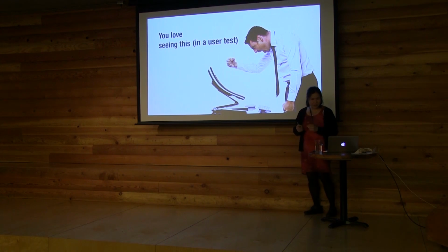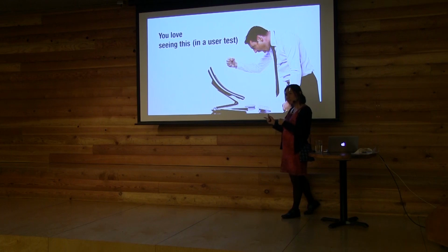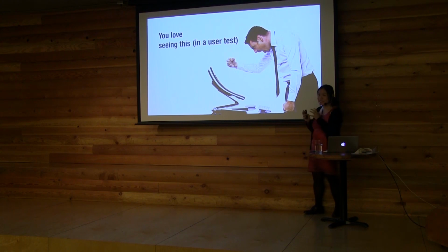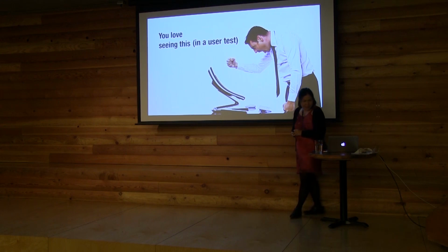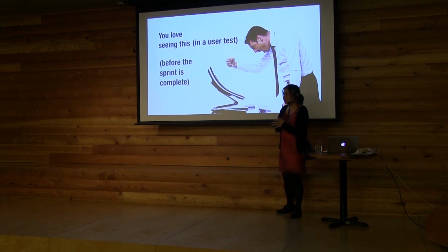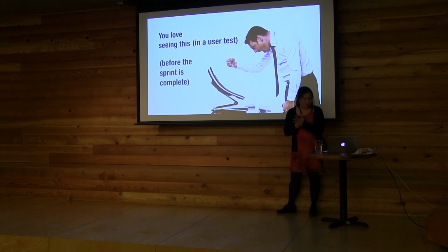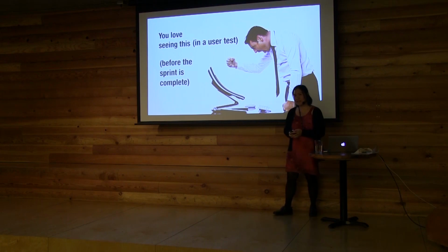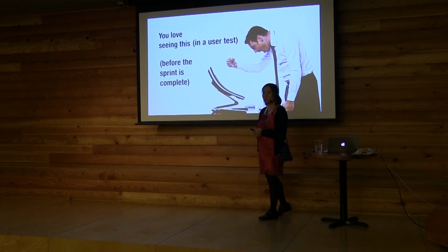So people who've done usability testing generally want to do more of it, and they're always like, well, why can't I get it into my schedule? Ideally, you want to do usability tests before you ship, and ideally before you fully invest in coding and testing. You want to fix your code while it's still cheap to fix.